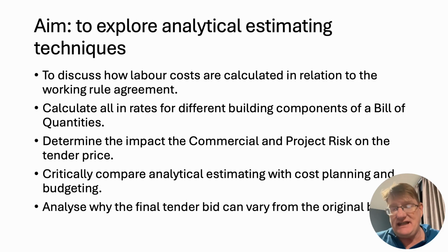It's not historical in nature, because it's fundamentally based upon things such as material cost, plant cost, labour cost, and up-to-date plant, labour and material time and motion studies.